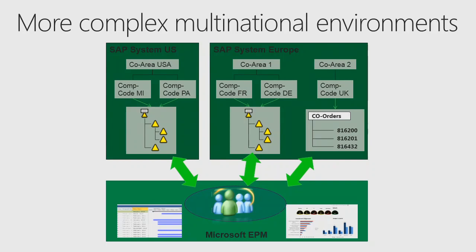So based on the resource and the task and the project, we can find the matching ERP system where we upload the actuals from the timesheets, or we get the actual cost from these SAP systems back into the Microsoft Project schedule. A big challenge if you think about the global environment, technically not that difficult in most cases, but the logic behind it can be quite challenging, so we have to make sure that we match and bring all this information back into Microsoft Project so we can really link these different worlds to each other.